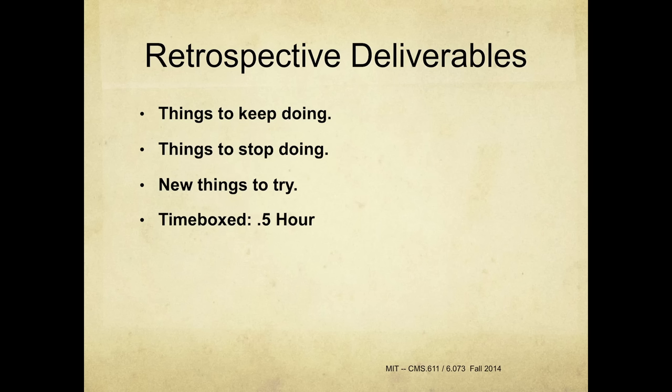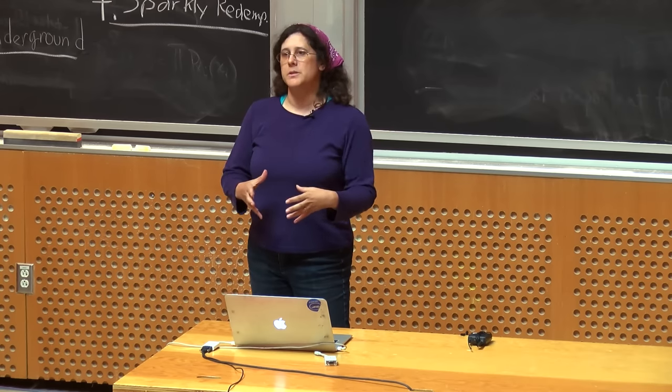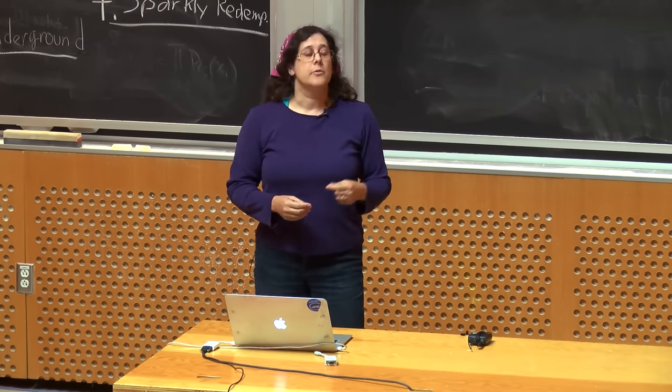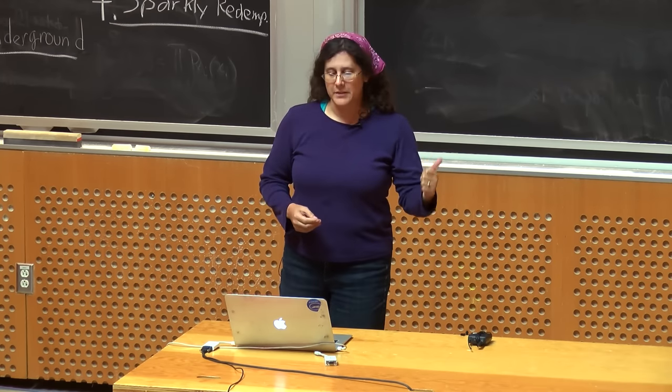The other end of sprint meeting is the retrospective, which is not the same as the sprint review. A lot of teams try to smash a sprint review meeting and a retrospective meeting into the same one, and they have very different purposes. The sprint review meeting is all about reviewing your product. The retrospective is about reviewing your process. It's about talking about the team.